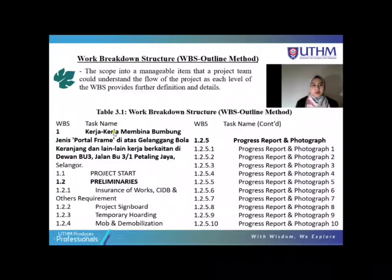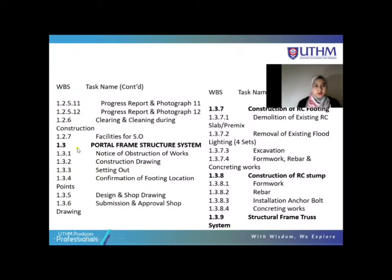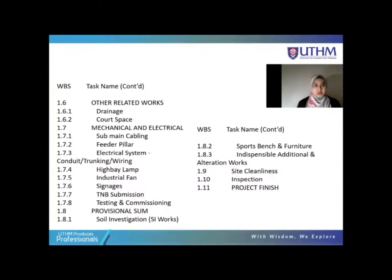This is our WBS structure that consists of four levels. The first level is the scope, the second level is the preliminary, and the third level consists of the photo frame structure, roofing and welding, other related works, and provisional sum. The fourth level goes straight to the project finish or handover of the project.